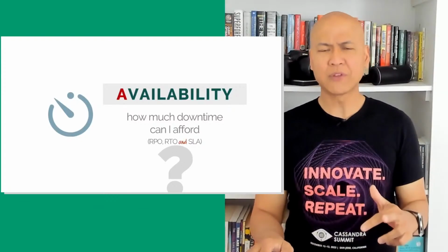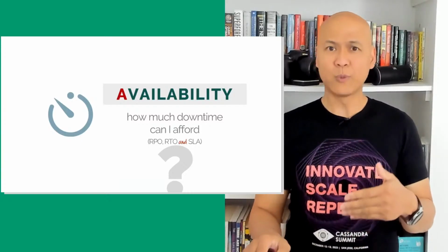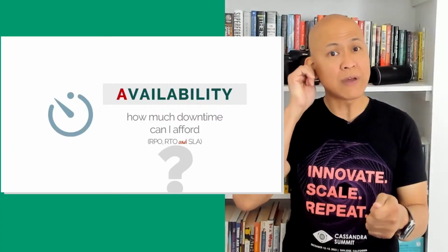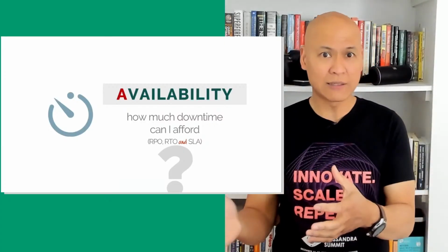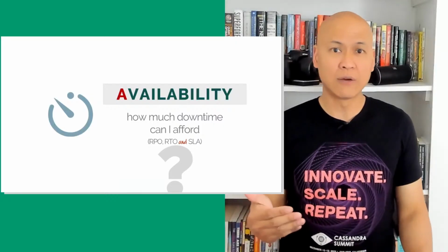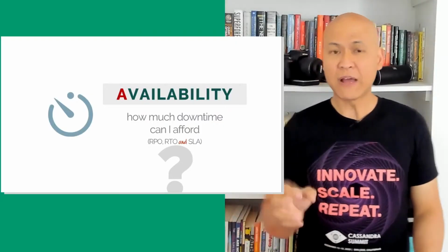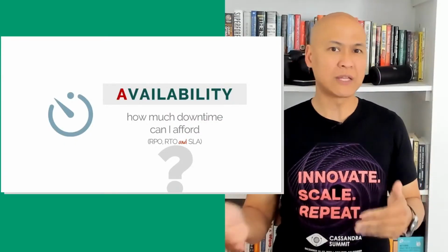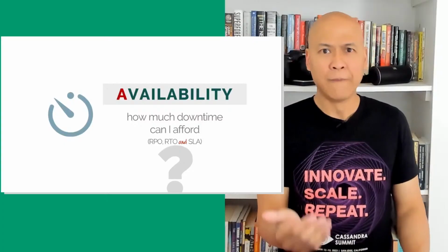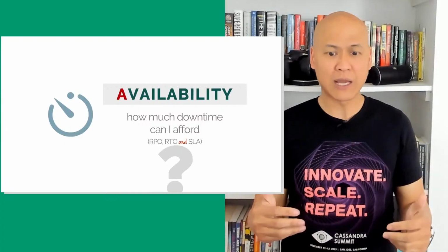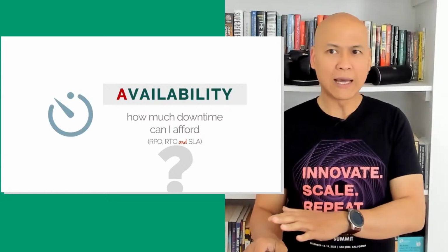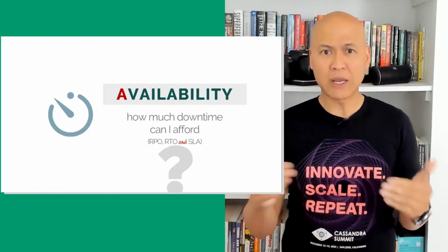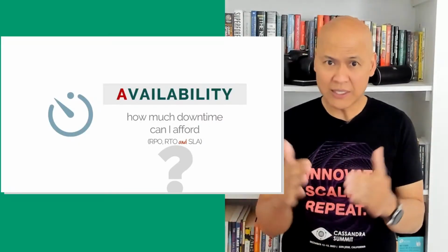Well, your recovery point and recovery time objectives are defined. There's a reason why you have existing high availability solutions, so you have to make sure that you're still keeping those. In fact, the last thing you want is to introduce massive disruption, even though you request a maintenance window. Your maintenance window should not be beyond your acceptable recovery point and recovery time objectives, unless, of course, you're setting the expectation for your customers on the acceptable downtime. But again, when we're looking at large-scale implementations of high availability solutions, there's a reason why you have that. Typically, your recovery point and recovery time objectives and SLAs are very tight.